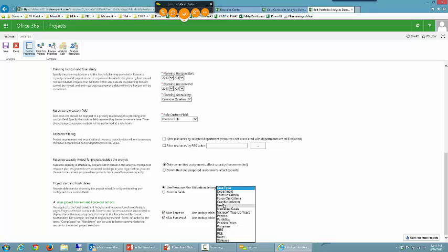And these are based off of what's called a lookup table. So you have to have an administrator create a lookup table and put several choices in that lookup table. Force in criteria could be things like regulatory compliance, internal compliance, maybe CEO pet project or something like that. Or if you wanted to force a project out of the mix, maybe you're forcing it out because you think the driver values are suspect, or it was really just kind of like a WAG. We don't think we quite have the details refined enough, but we did want to include it in the analysis just to see. But we're going to force it back out.